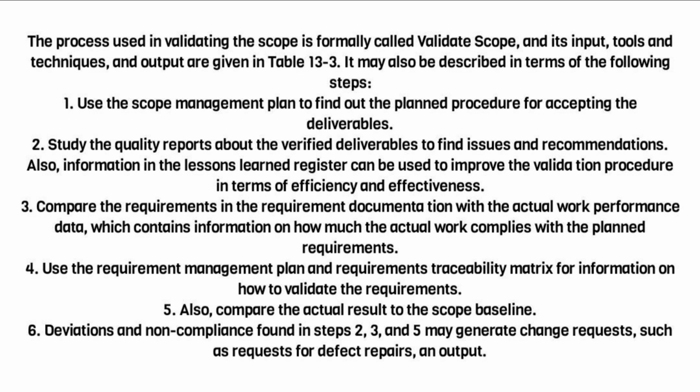and effectiveness. 3. Compare the requirements in the requirement documentation with the actual work performance data, which contains information on how much the actual work complies with the planned requirements. 4. Use the requirement management plan and requirements traceability matrix for information on how to validate the requirements. 5. Also, compare the actual result to the scope baseline.